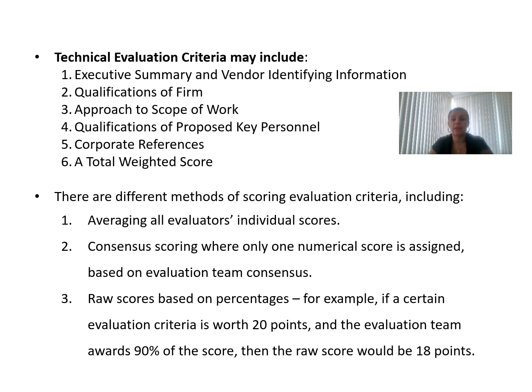At the end, this major scoring evaluation criteria should include the average evaluation of individual score, consensus score, and raw score based on percentage, that should then be scored based on the total percentage that is complete. At the end, what is really important is what are the items that should be evaluated, as I showed you in the example, and the way you transform that into a percentage of points. At the end, you should also have clear what is the criteria to move forward with that vendor.